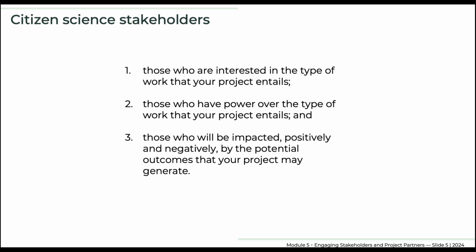1. Those who are interested in the type of work that your project entails. 2. Those who have power over the type of work that your project entails. And 3. Those who will be impacted either positively or negatively by the potential outcomes that your project may generate. Working with stakeholders has several benefits. One is that stakeholders can help to ensure that project data and information will be widely shared. Another is that some stakeholders may become partners who play a large role in your project. We'll delve into partners in the second half of this presentation.